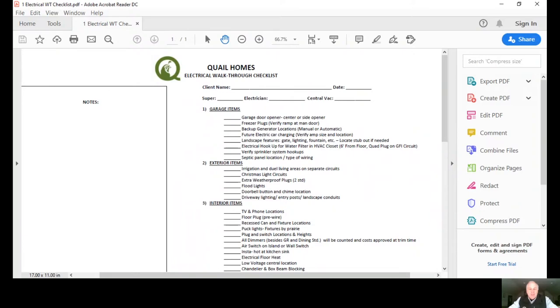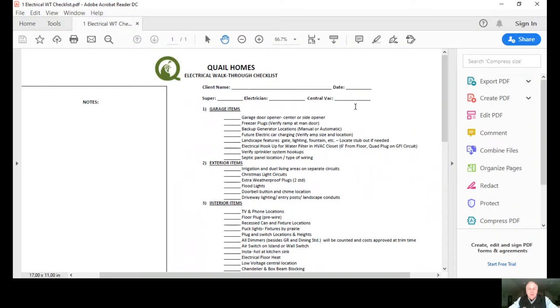The idea of the electrical walkthrough is we have an electrical plan that we've worked with you on, and now when we go out to do the job we actually want to have our superintendent there, our electrician, and if there's a central vacuum involved, that company there as well. And we want to tie in your electrical plan to actually what's happening physically on the job.